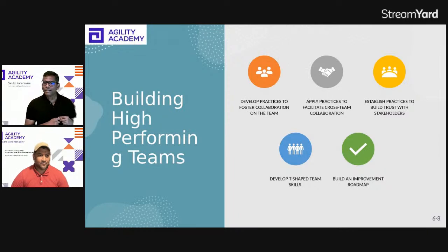What events are there in Kanban? Probably that's a topic in itself. We have a certified Kanban coach program which we offer. But in 30 seconds, if I want to address this question, Rashmi, everything which happens in Scrum happens in Kanban except the fact that you don't do any planning upfront. No sprint planning. So you have a daily sync, you might call it anything. You have prioritization, or you prioritize your backlog as and when it's required, and refine that backlog. You pull work only when you have available capacity.